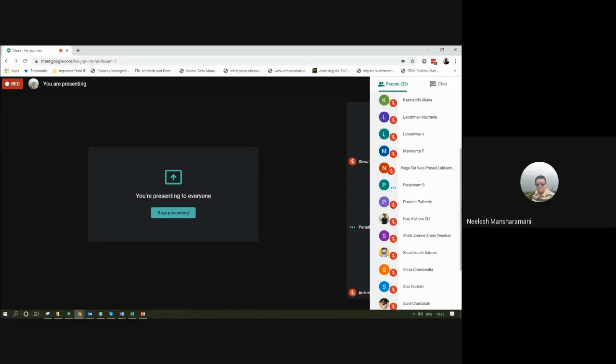Okay, I'll tell you. Forget about the Shrey account. For any account, if there's a monthly patching activity on production instances, we don't do it on production instances immediately. We first do it on the test and dev environments. Say patches are released in the first week. In the second week, we perform patching on test and dev. For that also we take AMIs, then we do it. If it works fine, we remove the AMIs. Simple. Next, when the test results are clear, management approves, and the customer side approves, then we proceed with the production environment with proper communication in the following week. Before that also we take an AMI, do the testing, and then proceed further. That's how it should be done.